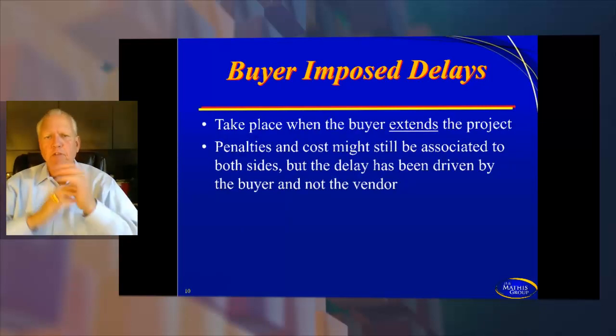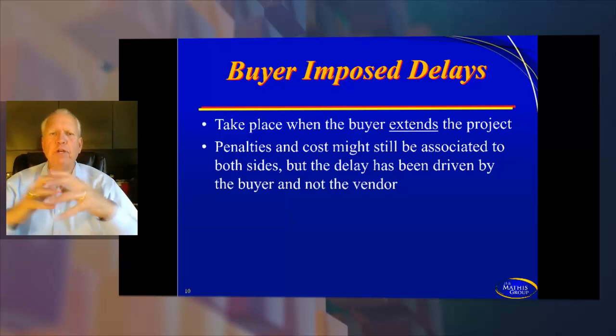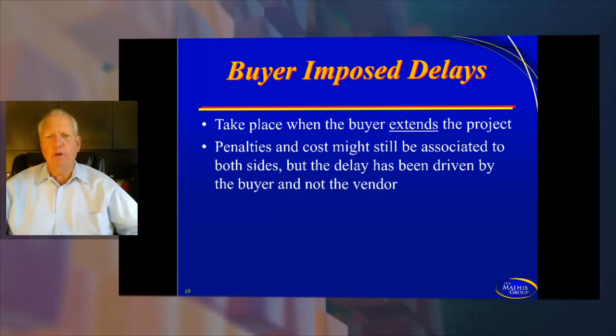Buyer-imposed delays take place when the buyer extends the project. You'll normally see this through a bona fide change request. Penalties and costs might still be associated to both sides, but the delay has been driven by the buyer, not the vendor. Now, if it's a legitimate change request and an extension, those are normally acceptable, but it does impose delays as to what was anticipated in that project in the beginning.